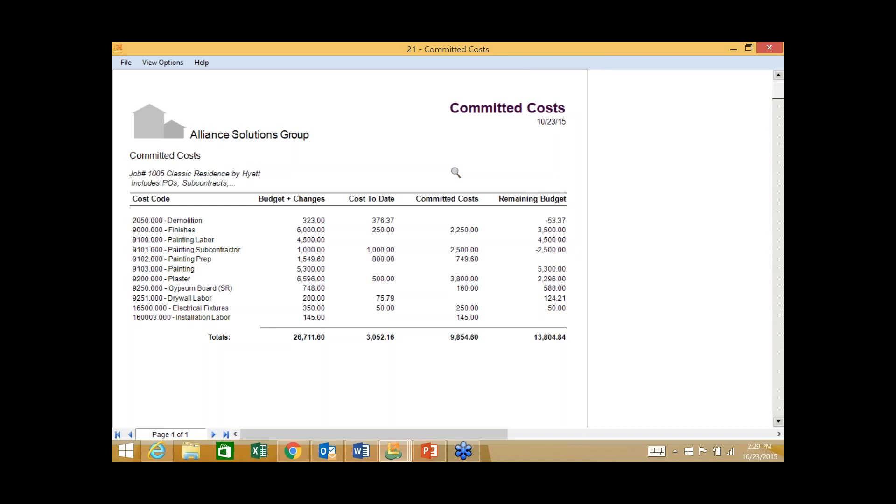The power of this particular report, and the reason why I'm showing it, is it's a great report to look at at the beginning of your project because I can quickly see if we are producing any buyout savings or not. But the other thing is at the tail end of the job. If I go pull a job cost summary report and we're just killing it, we're doing great, that's what we're thinking anyways. Job's complete, we're under budget, and we're celebrating. Well, not so fast, because for all the folks on the call that are down here in Florida, we all know sometimes our vendors will bill us a little late, whether it's a supply house or a sub. Where this report can be valuable from a job closeout perspective is before I do my happy dance about how great I did on my project, I might want to pull up this committed cost report and take a look at it. Because if I see that there are any costs in this column here, I can quickly be notified that we probably have not been billed for that item yet. That's why it's still committed. So this becomes a valuable report not just at the beginning of your job but actually during your closeout as well.